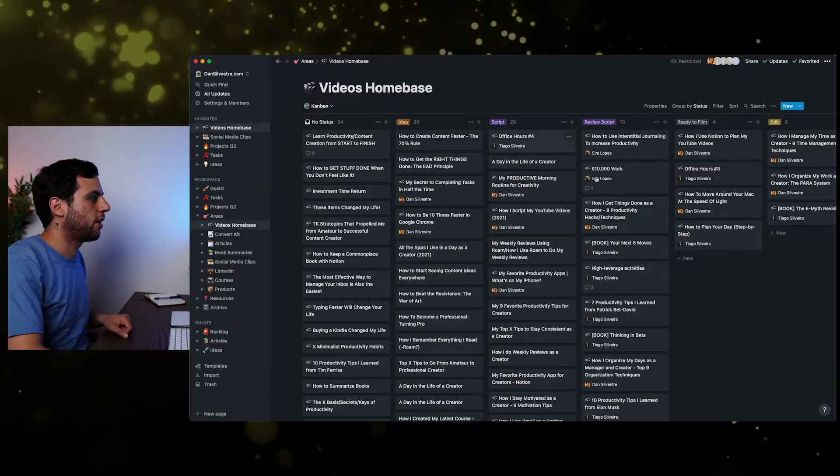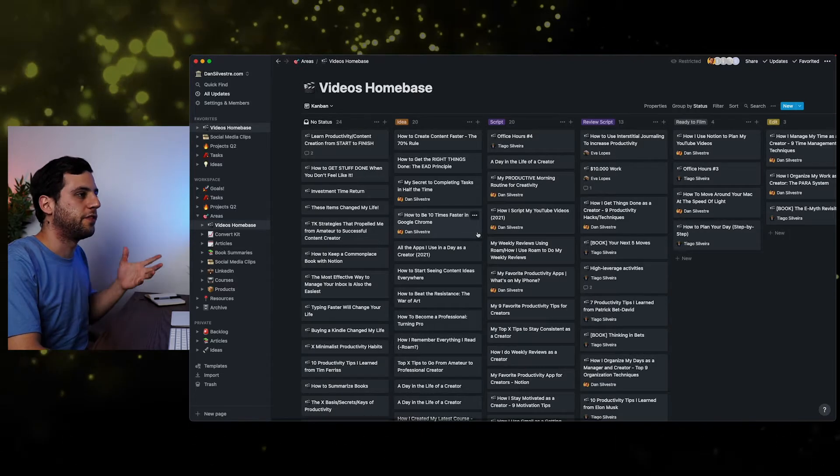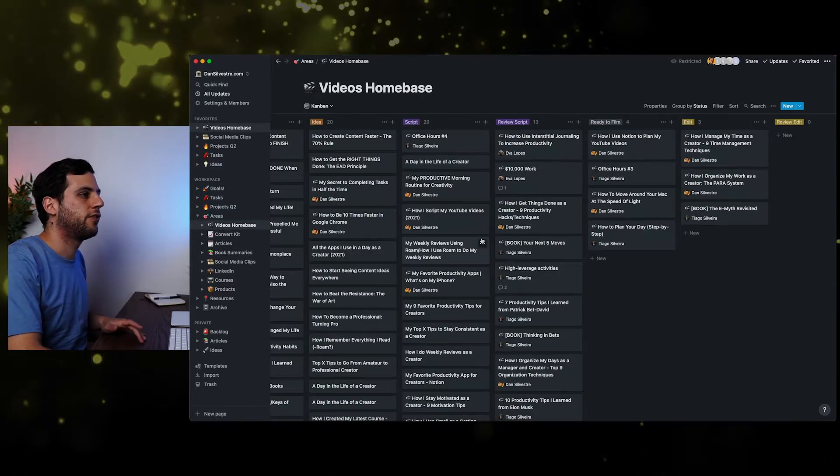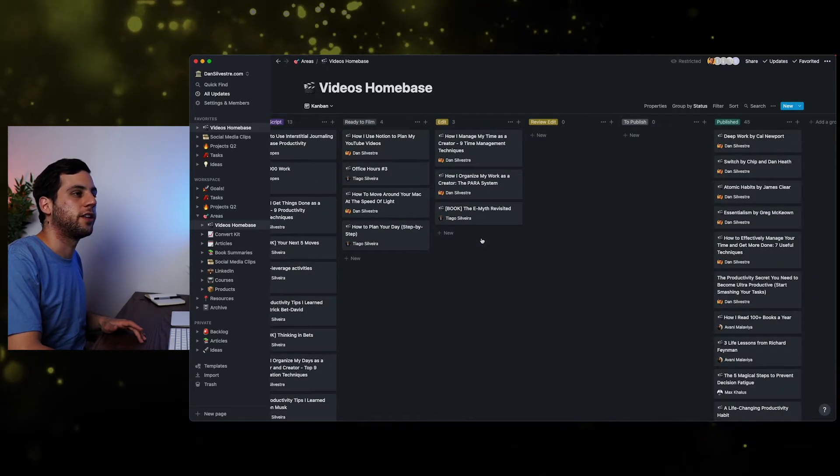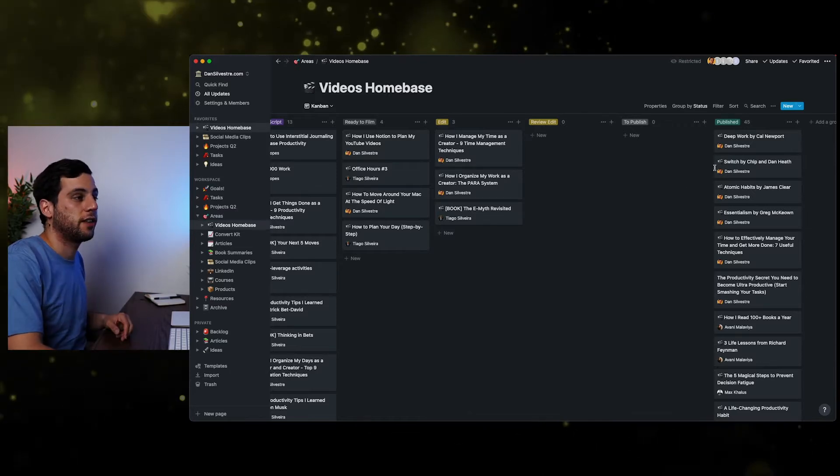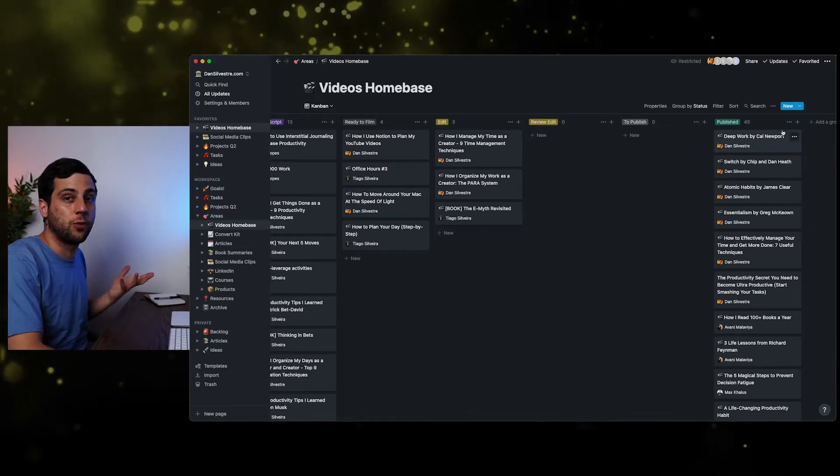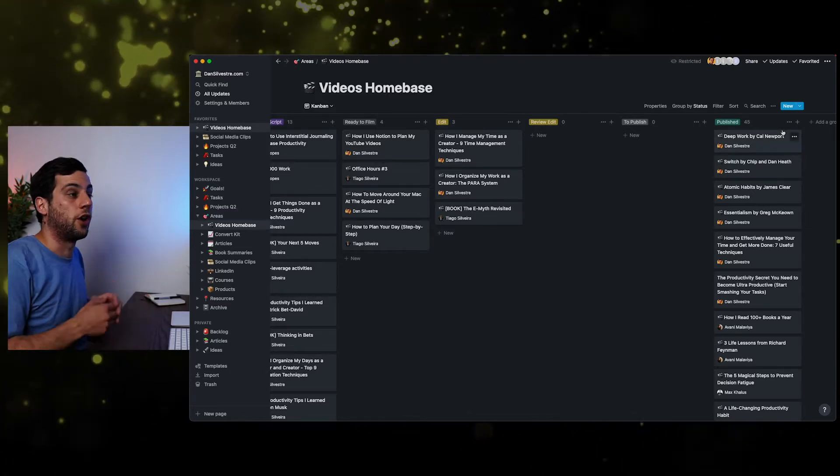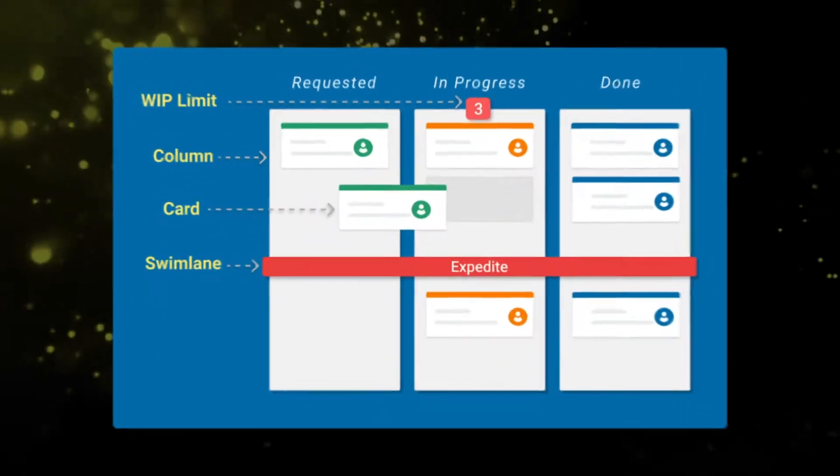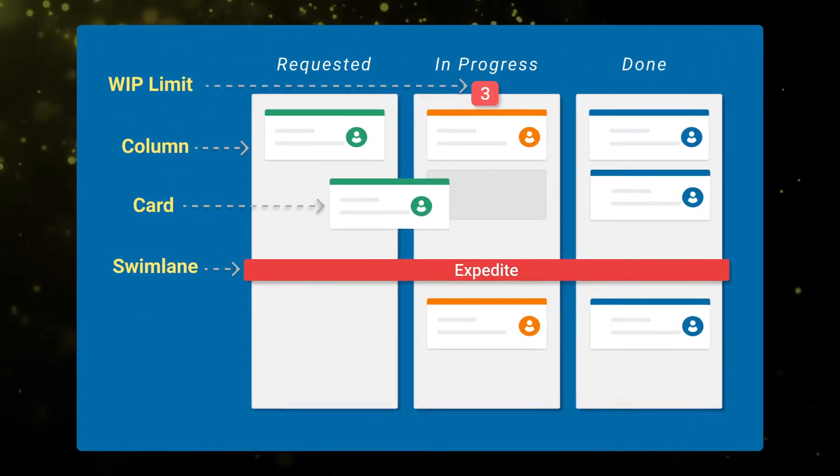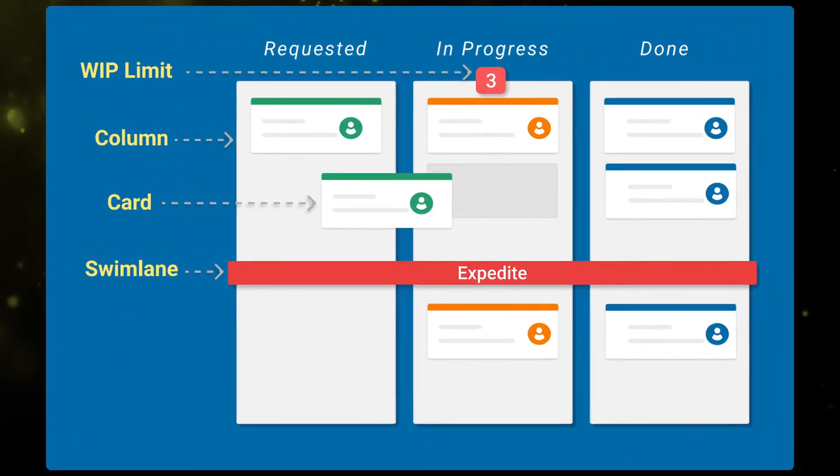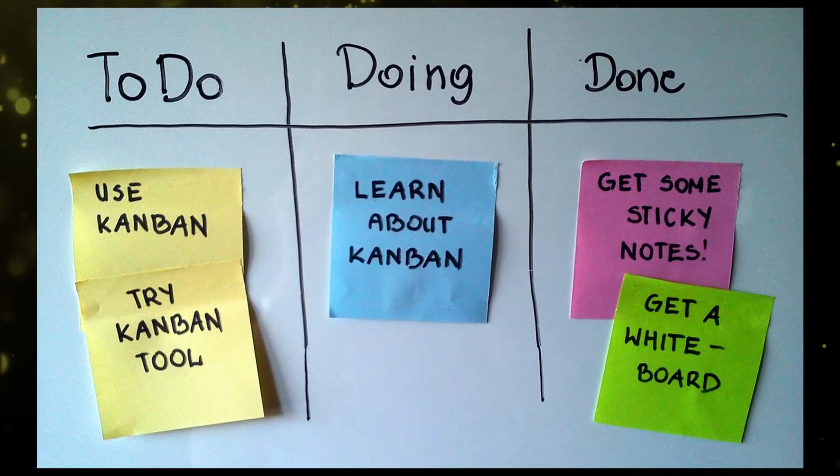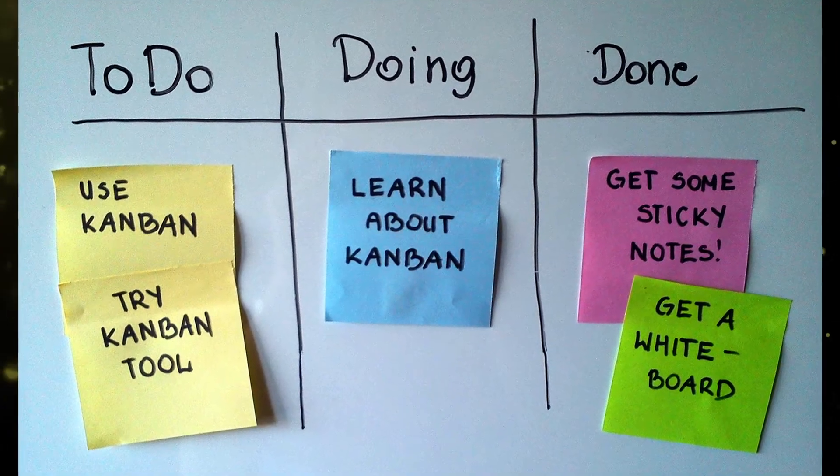So let's have a look at it. And you'll see here that there are a lot of columns here. Ideas, script, review, script, ready to film, edit, review, edit, to publish. And then finally, we have published. So you'll see here that at this moment when I'm recording this video, I have 45 videos published on my channel. Now, this is what it's called a Kanban board. So the Kanban board comes from agile management. And the most basic Kanban only has three columns, which is to do, doing and done.